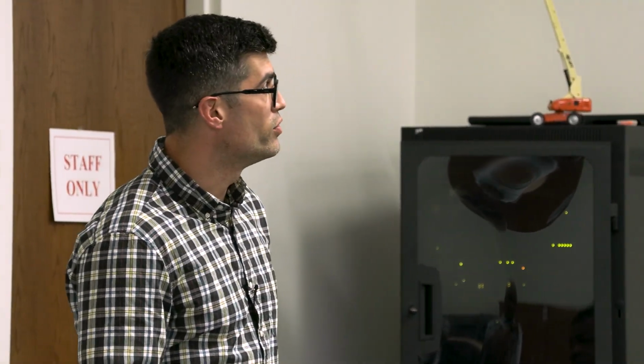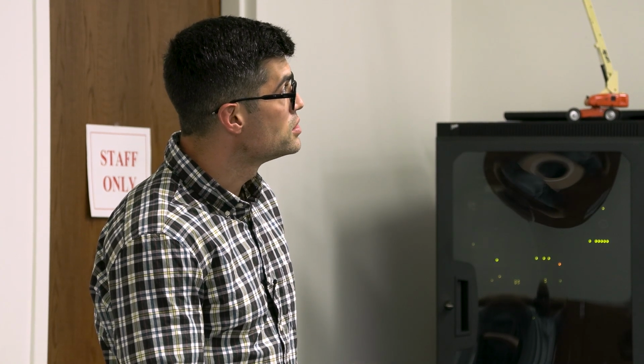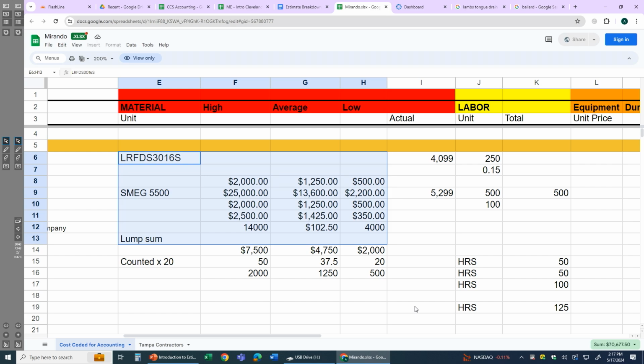So what I'll do moving forward is give ranges. This covers my ass too, by the way. So Tommy, you might want to present to that owner, hey, the stove you're looking at could cost up to 25 grand if you really want to go that high. The low is about 2,200, and then we come up with an average cost. If I'm basing it off a feasibility estimate, I put in ranges, and then I'll reflect the average in my total cost. But it's documented and shown, these are the ranges.